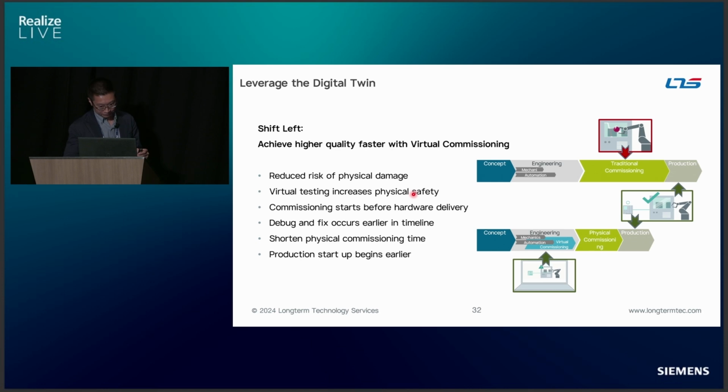Yeah, and also, all of the uncertainty you're going to come across in traditional commissioning, you can shift to the early stage of your project timeline, right? Basically what we are trying to do with virtual commissioning is break down all those uncertainties and shift them left, to the early stage of your project, so that you can work on them earlier. As long as you have something ready, you can test it in the virtual world without real equipment, so you can solve a lot of the problems, small or big, in the very early stage before they bury too deep in your project, causing a big problem at the very end of the day.